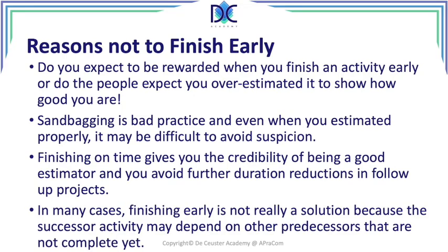Finishing early is not always a solution because we also have successor activities. The activity may have some successors, and that successor may have other dependencies, other predecessors. The problem here is that when you have those predecessors, you can only continue with that activity when the predecessors are completed. So it's not always interesting to finish early.